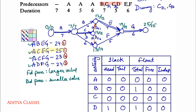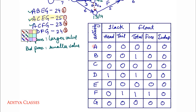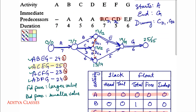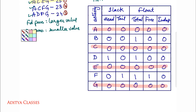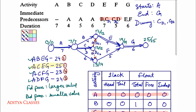Once again, let us check if all the critical activities have all slacks and floats as 0. The critical activities are A, C, E, G — and they all show 0. That is the special thing about critical activities: they do not have any leverage, neither for slack nor for float. This can act as a very good check. Thanks for watching. Bye-bye.